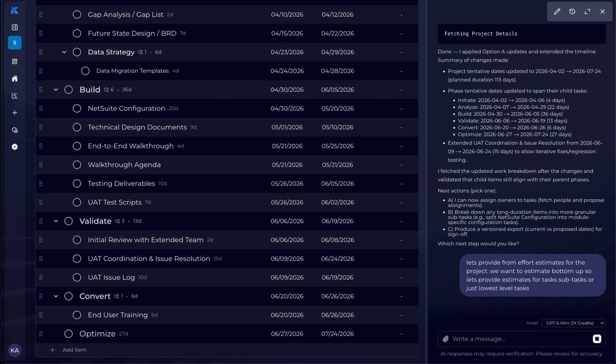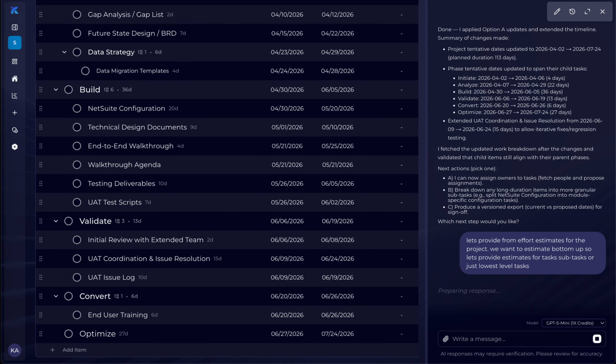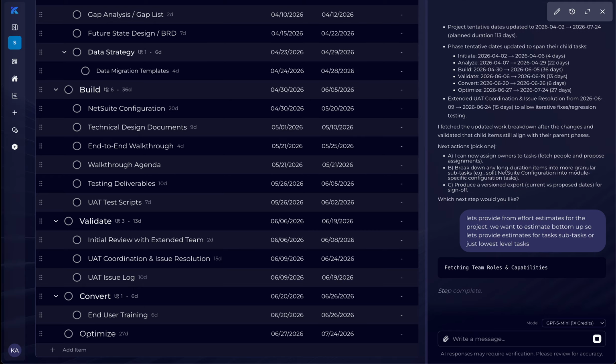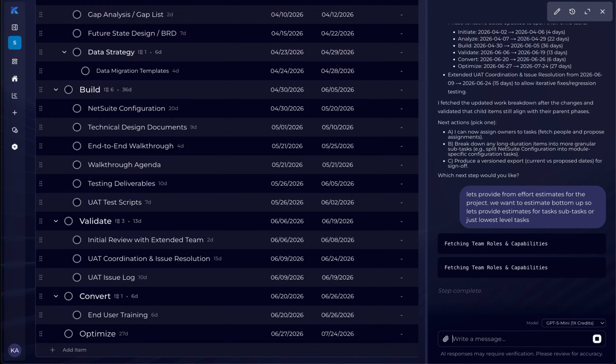And this is a really good sort of approach. There are generally two approaches you take, top down or bottom up. And the best way to do it is if you're doing a budgetary guidance, you would do top down estimation. If you're doing hard estimation for actual sort of an SOW scope, you'll do bottom up, because that's where you want to make sure you're not guessing what your estimates are, and you want to be way more accurate. And bottom up only works when you have a detailed scope. If you don't have a detailed scope, you go top down.